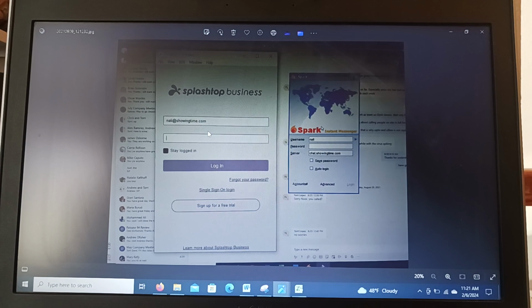Before the go-live time, there's a pre-go-live. Then after you assign, okay, out of 944 assets, say 450 of your assets you're working on, it's all complete and done. Out of 450, 25 have issues. And 25 people are waiting for a new PC to come in, unable to do it. So that becomes your RAID and a blocker. Then you've got to let your project manager know. You've got to let your senior manager know. You've got to let your assessment team know. And those who are sitting, say they're using Rapid7 to run scans or any other tool they have, right? On the cybersecurity side, you've got to let them know. You've got to let the desktop service team know that these are done, these are waiting, right?